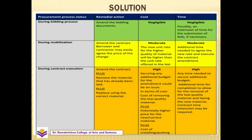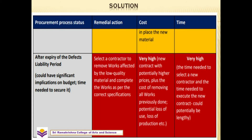The additional time for completion would allow for the removal of low quality material and laying of the new material — a contract time extension may be required. At the final stage of the procurement process, after expiry of the defects liability period, if defects are found, it could have significant implications on budget and time. The remedial action would be to select a new contract to remove works affected by the low quality material and complete the works as per the correct specification. The cost would be very high, including a new contract at potentially higher price, plus the cost of removing all works previously done, potential loss of use, and loss of production.